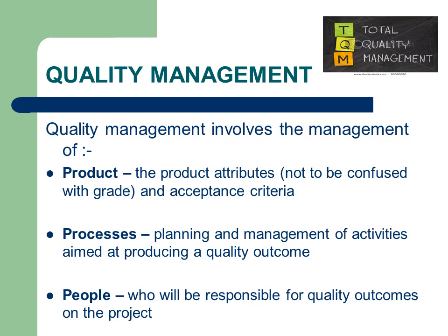The project management team must be careful not to confuse quality with grade. Grade is a category or rank given to entities having the same functional use but different technical characteristics. Low quality is always a problem. Low grade may not be. For example, a software product may be of high quality, that is, no obvious bugs, readable manual, and low grade, a limited number of features. Determining and delivering the required levels of both quality and grade are the responsibilities of the project management team.